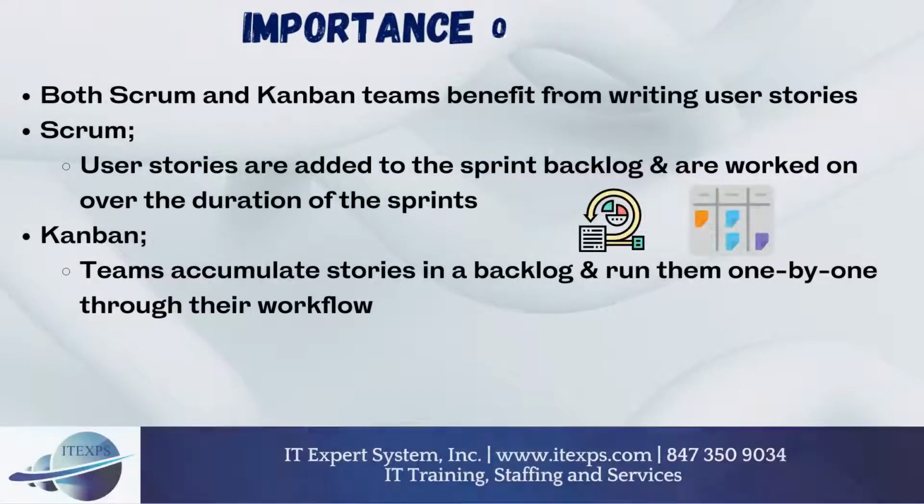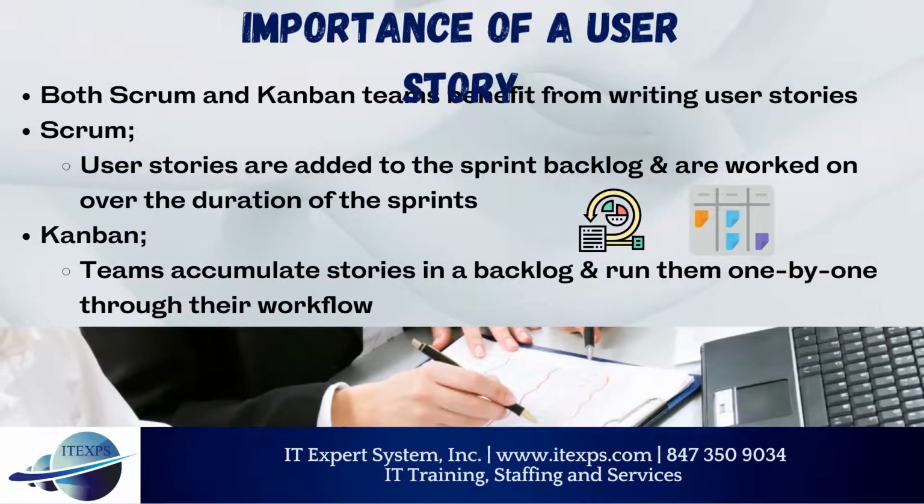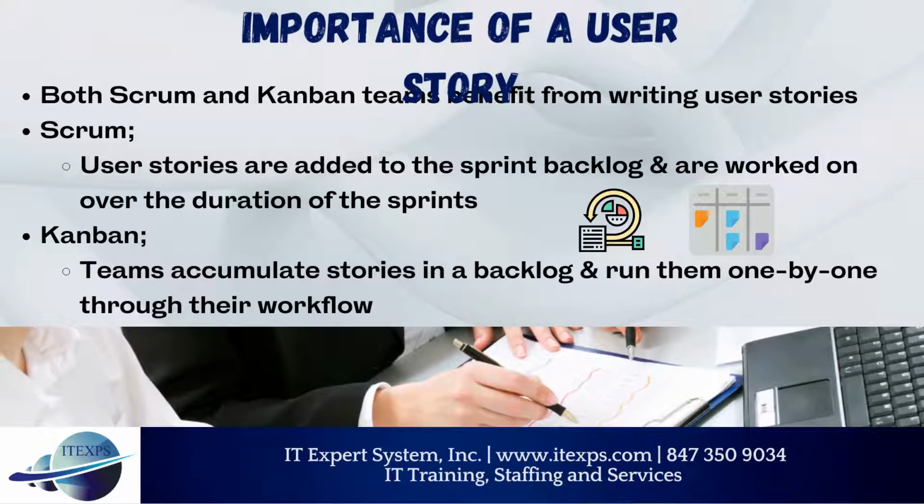Now, let's understand, why do we need to write user stories? What benefits does it provide? User stories originated from a need to break down projects into smaller incremental segments, for sprints and iterations. If you are familiar with an Agile framework, then most probably you are aware of the fact that both Scrum and Kanban teams greatly benefit from writing user stories. Let's break it down further. In Scrum, user stories are added to the sprint backlog, and are worked on over the duration of the sprints. In Kanban, teams accumulate stories in a backlog, and then run them, one by one, through their workflow.